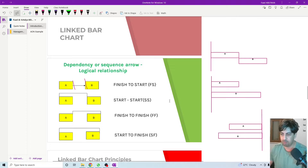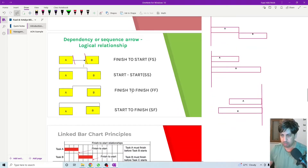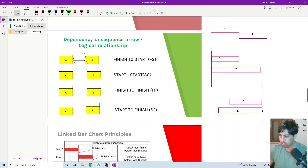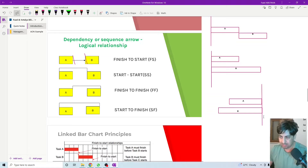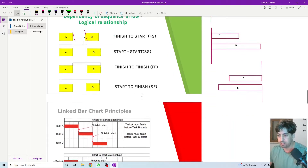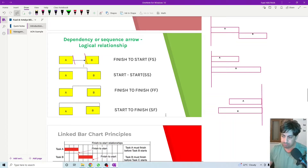The third type of relationship is finish-to-finish. Activity A and activity B are linked from their finishing point. Activity A and activity B must finish at the same time. I don't look at the start of each activity — they are not linked from the starting point. No matter when they start, they must finish at the same time.